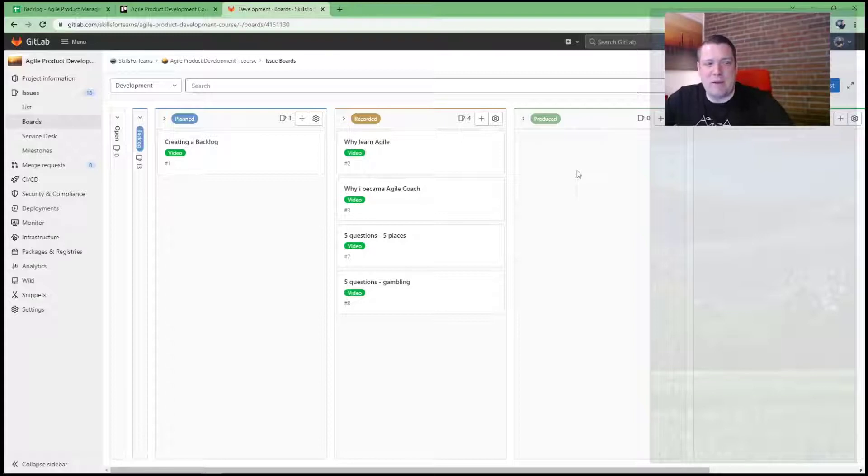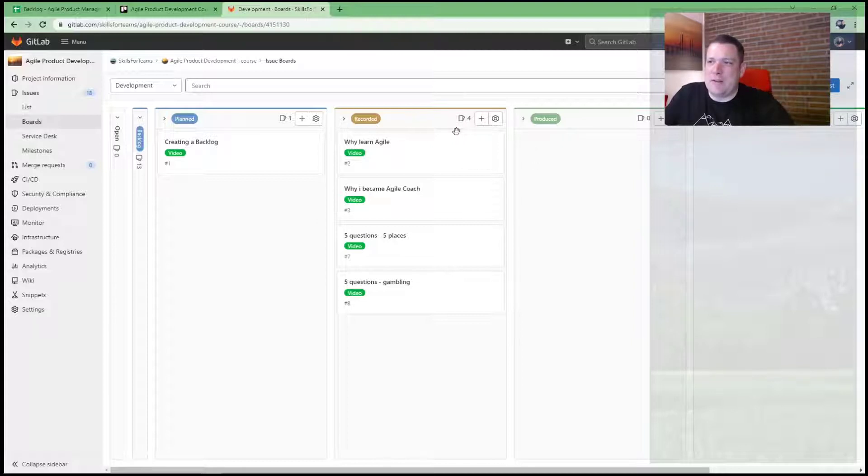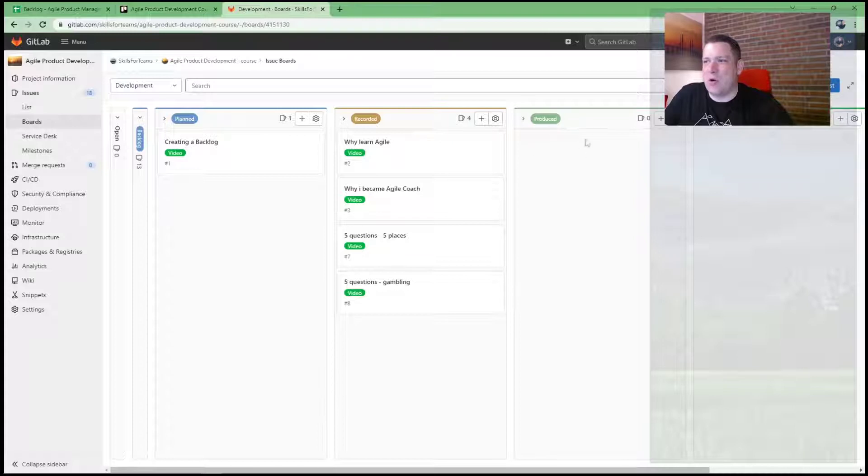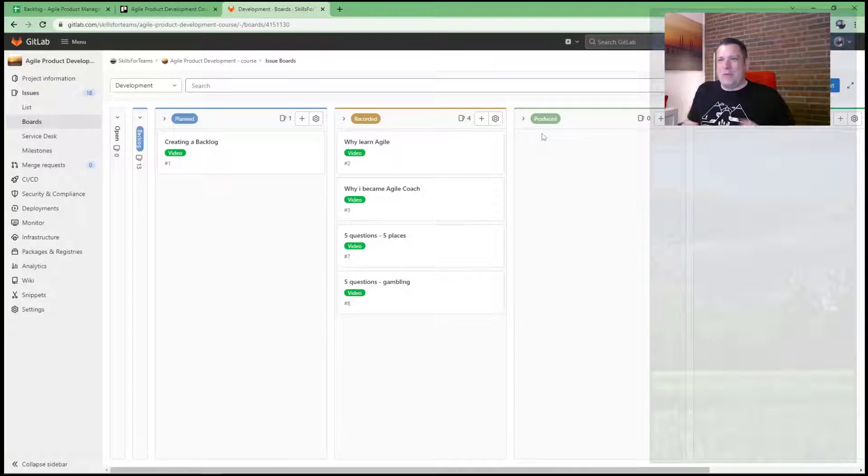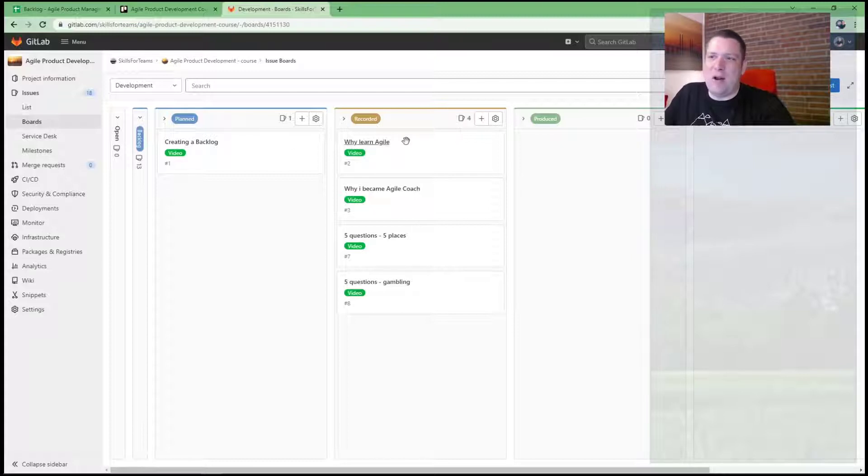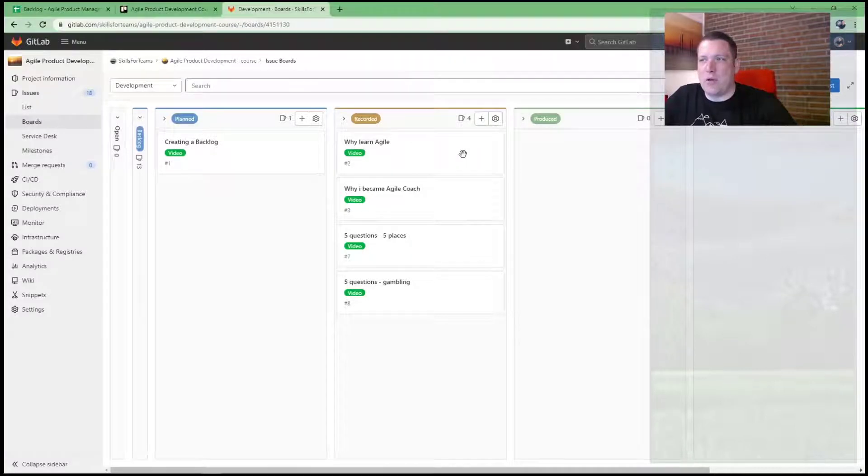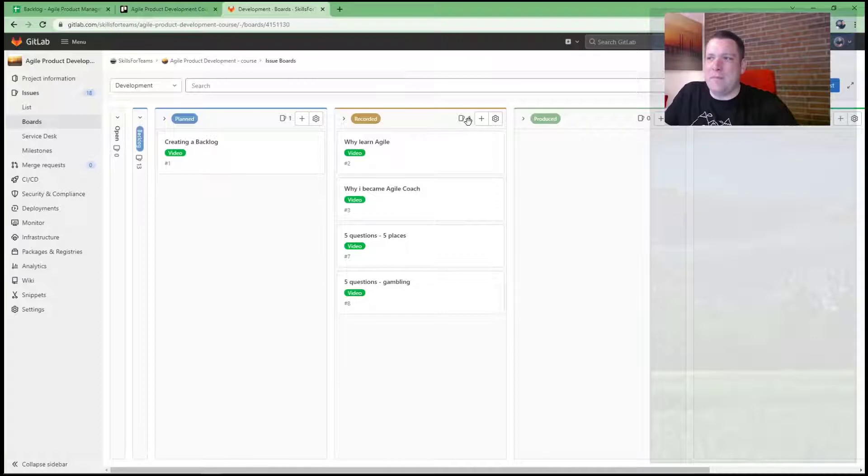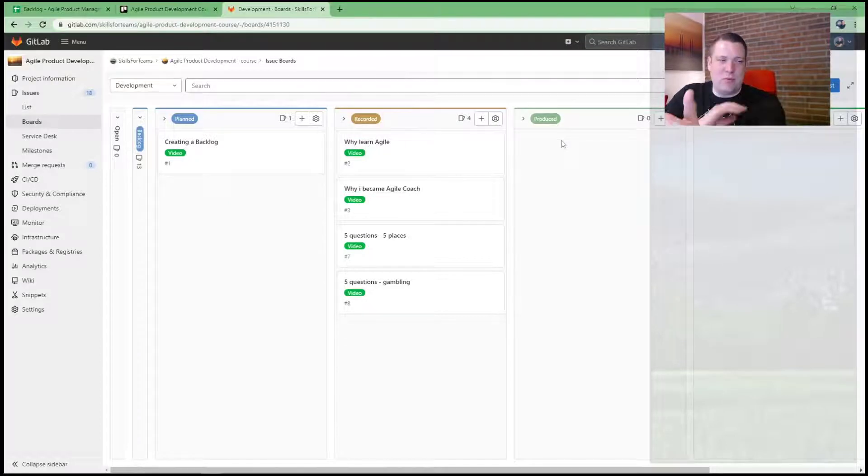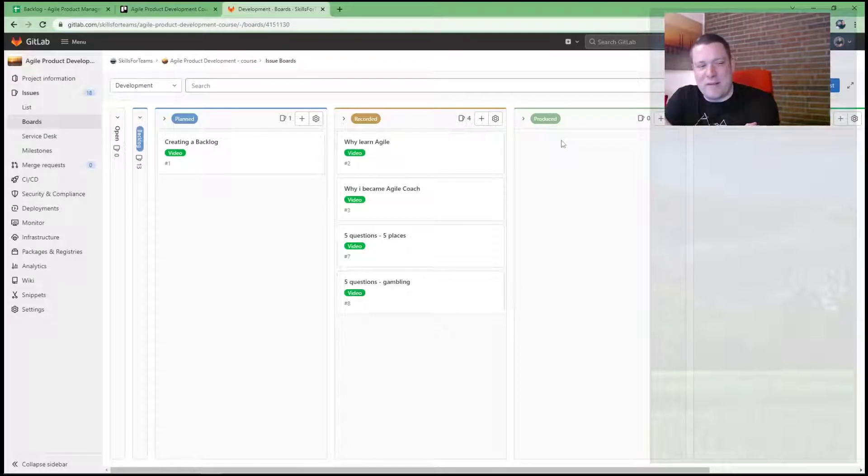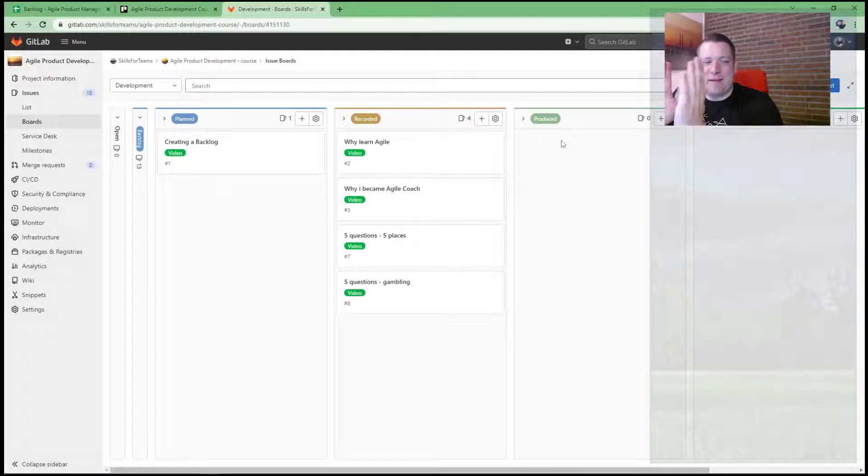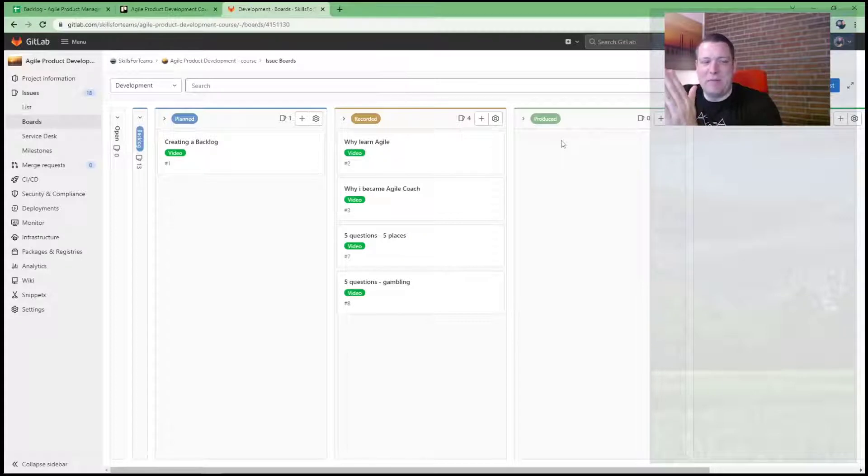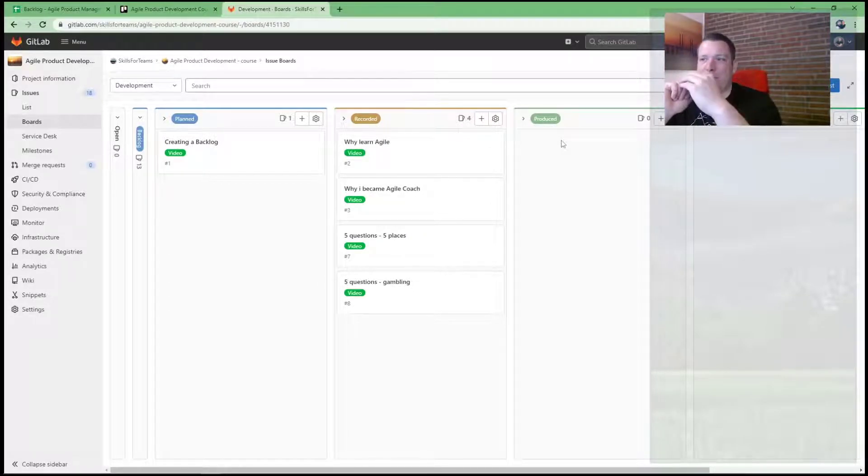Like I could say more people should work in producing or we should spend more time in producing before we record a new video and actually finish this once. Or actually that would be something in Kanban. This technique is called a work in progress limit. So you put a work in progress limit in a column. For example, here should maximum be four tickets or three. And then you have to produce one and publish one before you start the next one. That's the principle of how it works in Kanban. I think it's a good principle as it's avoiding like we have a bottleneck. Everything is waiting into one column and not getting forward. It forces you to find a solution faster.